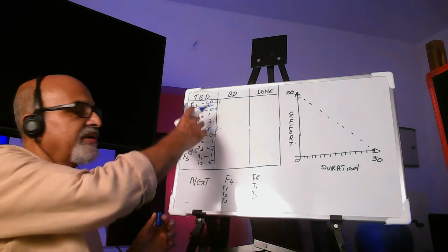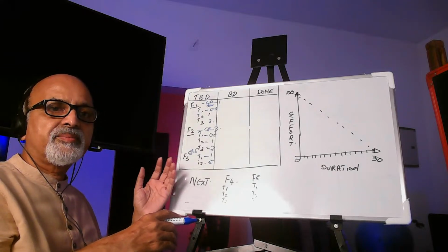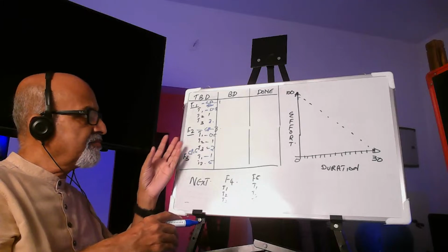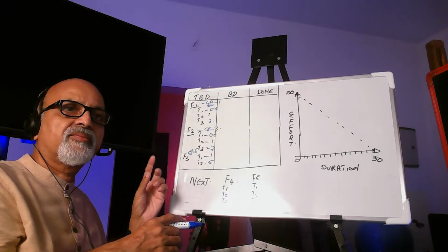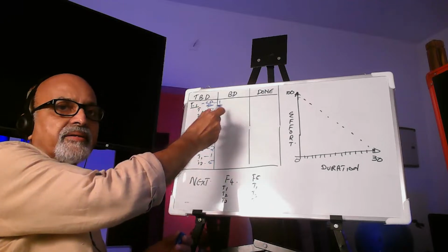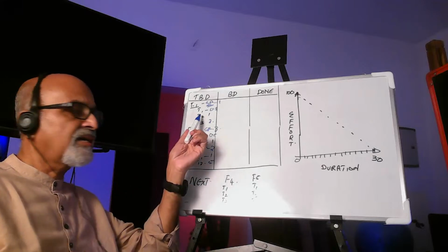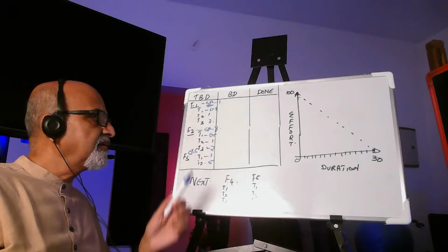So we have the features and the associated tasks to be performed to complete those features, and we have the estimates for them as well. For features, we have the story point, and for the associated tasks, we have the effort in person days.